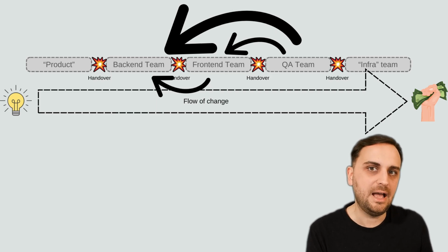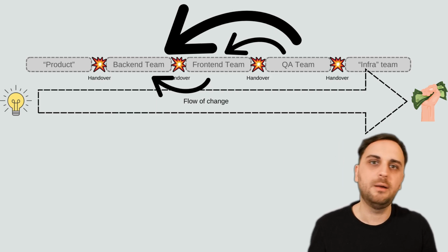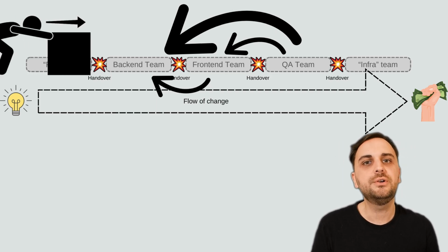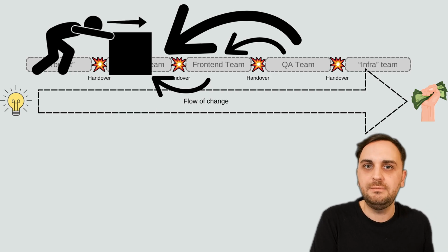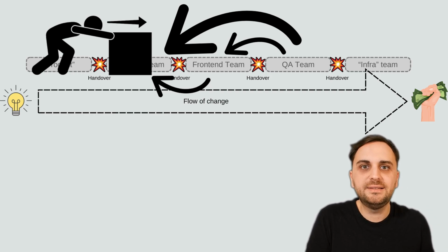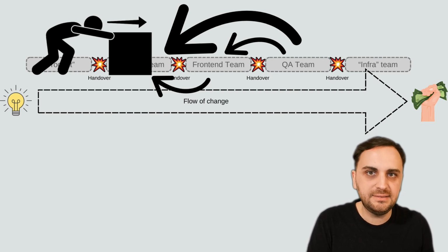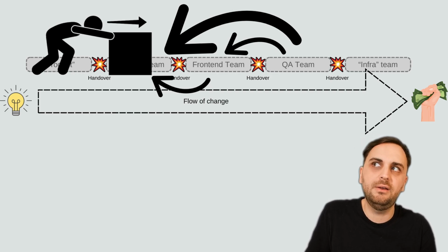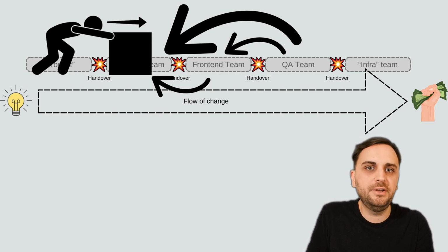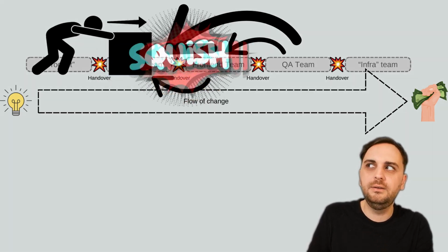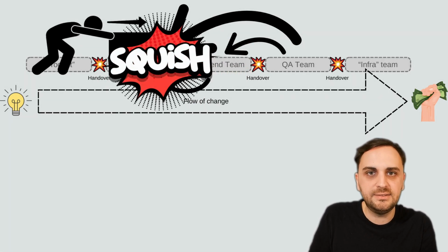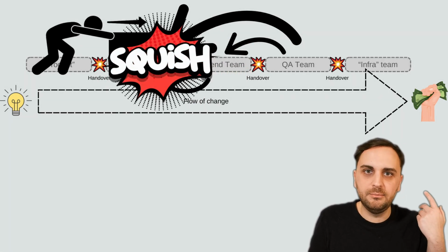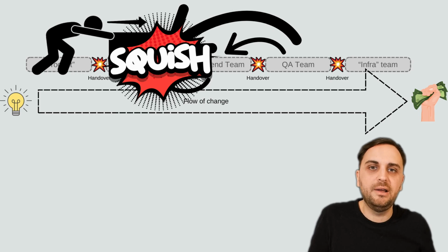While all of that is happening, there's this enormous amount of pressure coming from the other way to make sure that there's something those other teams can work on. So they're not sitting there idle waiting for the next task. There ends up being a whole bunch of work pushed upwards saying, while you're waiting for the backend developers to fix that API, can you maybe do something like this? So now whatever context they had in their mind is being evaporated by the new work.